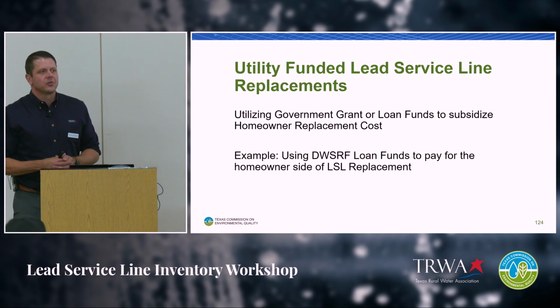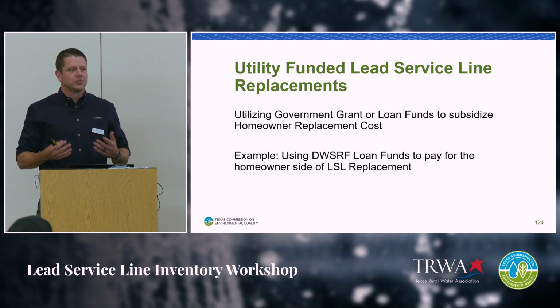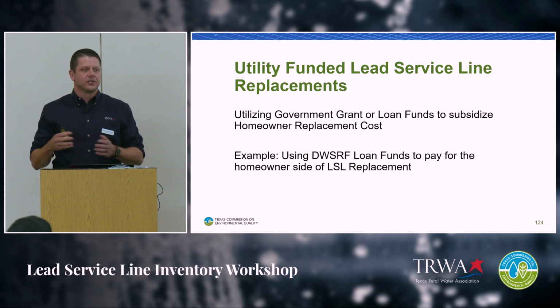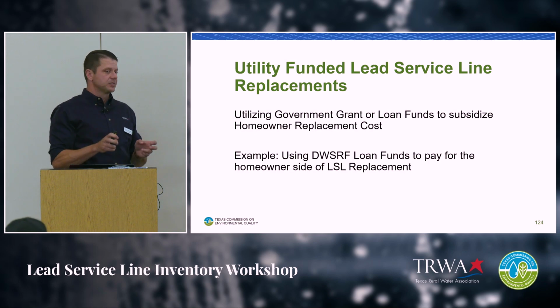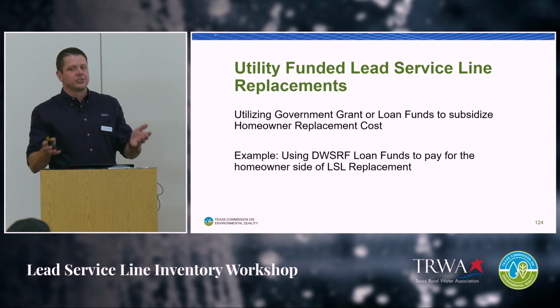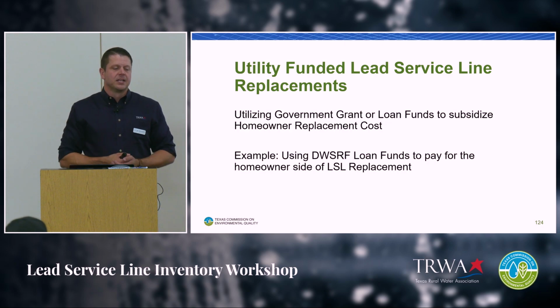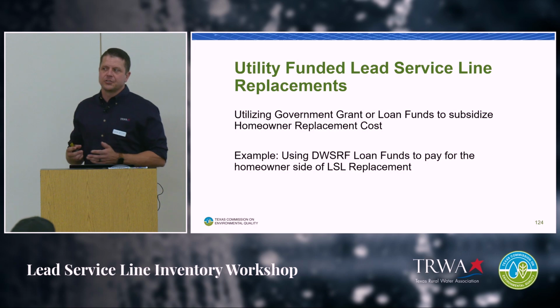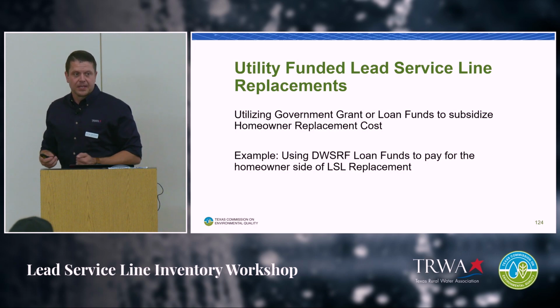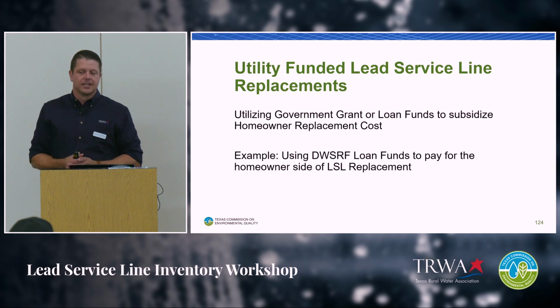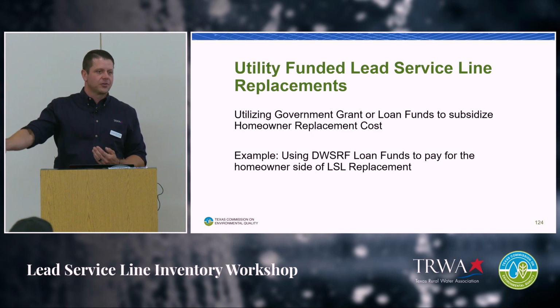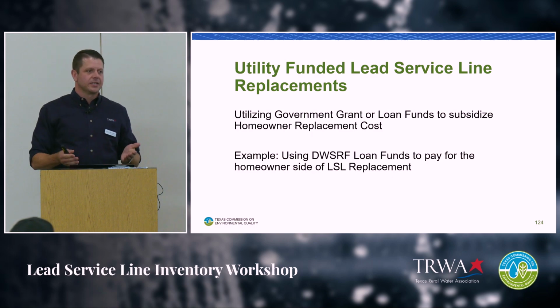Whenever I've spoken to a few different utilities who are considering doing this, say they do have a line that has to be replaced, it is the customer's responsibility to replace it, but it is you as a utility who has to make sure it is done. So there's a suggestion that you should probably use contractors, or in this case, if you were funding to get it done, use local plumbers or something so that the liability is on a third party. It's not on the utility itself.